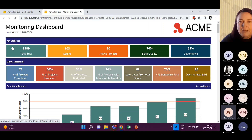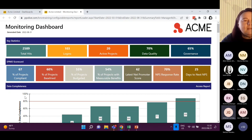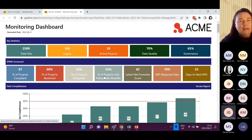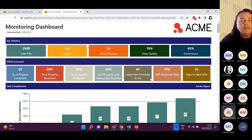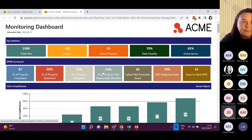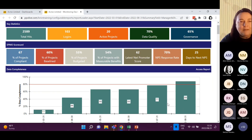A lot of you will be familiar with these top key statistics. One of our clients has an EPMO scorecard where they're basically tracking all the projects to make sure who's compliant, how many projects are baselined, how many have got a budget, how many have got measurable benefits. They take an average of that so the EPMO is actually scoring itself in terms of compliance across the board. This client also does net promoter scores - they run surveys with stakeholders to see how the EPMO is doing in the organisation - another way of tracking the quality of work coming out of the PMO.